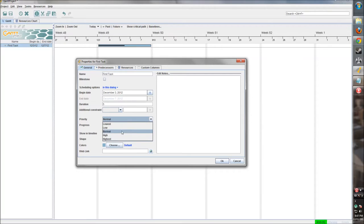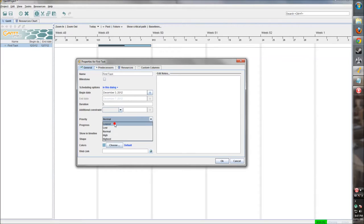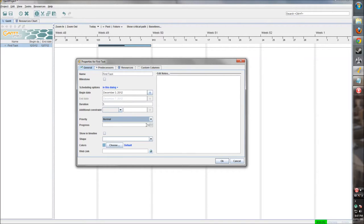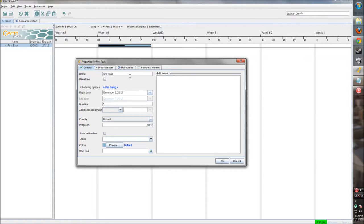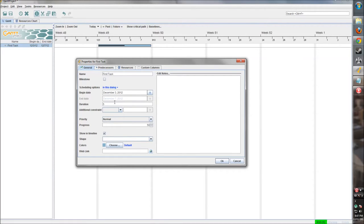We can change the dates here as well as manually in the chart itself. These are constraints that can be added to it, so we can only begin it at this date. Here's our priority - what priority is that task? Is it high priority? Should we do it right away or should we make it a little lower? If it can be put on the back burner, keep it at normal for now.